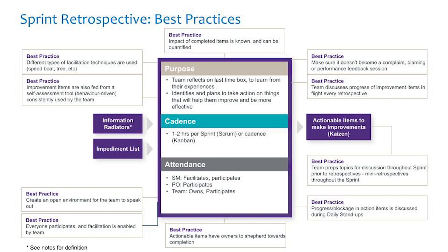You want to spend about an hour on this per sprint. An hour is more than sufficient to go through it. You want the Scrum Master to facilitate. This is really important for the Scrum Master to facilitate this well so the team can build on their collaboration skills instead of finger pointing. You do not want your stakeholders here. This is very much a couples therapy sort of session.